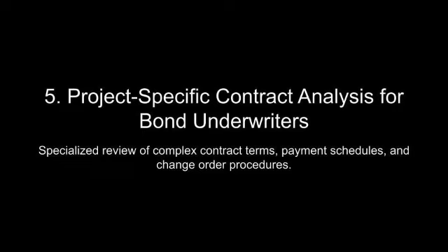and mitigation. Best practices in these industries begin with a thorough review of the force majeure provisions in the underlying contract, ensuring that they are clearly defined, enforceable, and aligned with industry standards. For example, in regions vulnerable to hurricanes, contracts should explicitly address the impact of such events on project timelines, costs, and responsibilities. Underwriters should also consider the contractor's track record in managing force majeure risks, including their experience in similar projects, the robustness of their contingency plans, and their financial resilience.